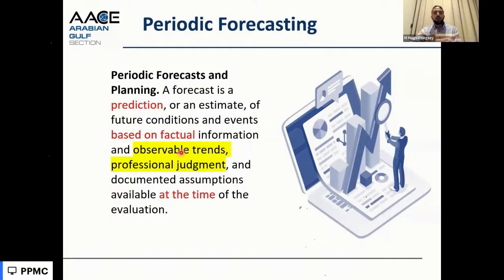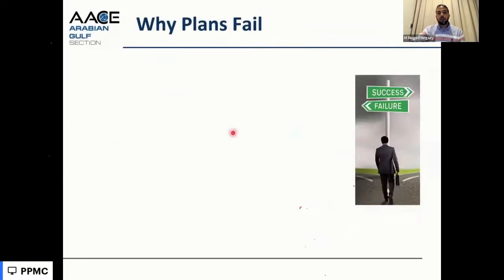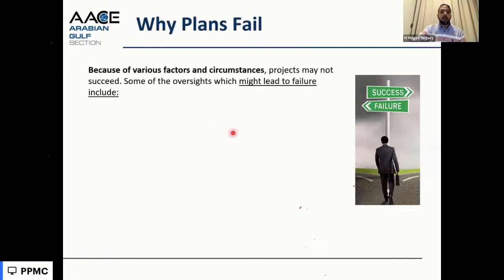So we planned that the crew will do 100 meters a day, while actually the crew is doing 50 meters a day. So it's affecting like double the duration. These things need to be considered in the remaining duration and the required resources. We need to recalculate and forecast the trends of the crews and their productivity to get the appropriate forecast completion date and know the delays.